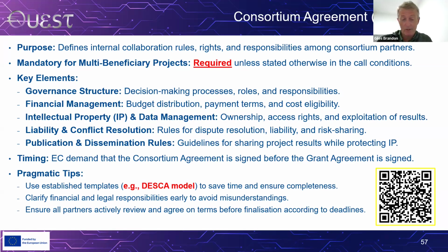Timing: the Commission stipulates that the consortium agreement is concluded and signed before the grant agreement is signed between the project coordinator and the European Commission. Now, this is what the Commission stipulates. They don't necessarily police it, but they can. So anyway, long story short, it's actually in your interest to get the consortium agreement sorted out and signed before the grant agreement. Some pragmatic tips in this regard.